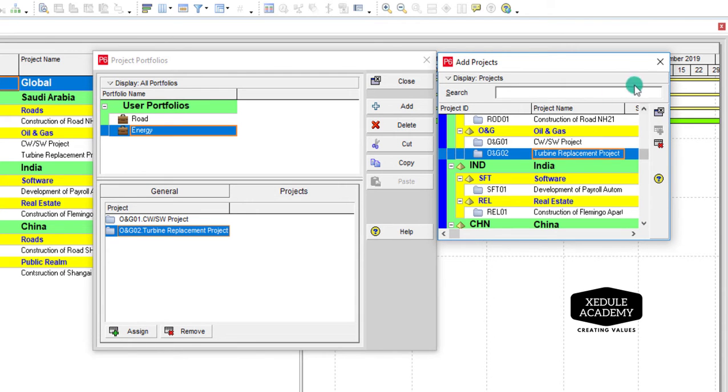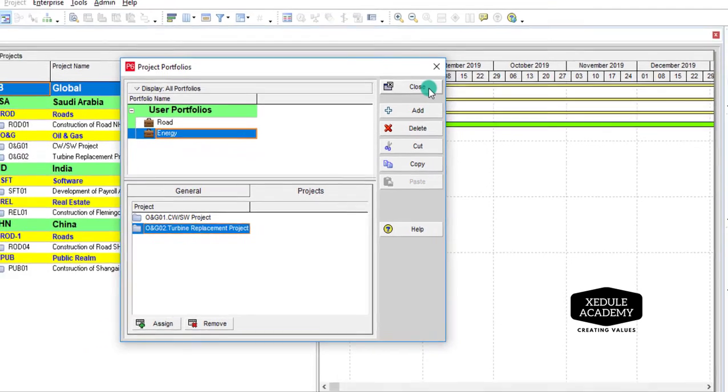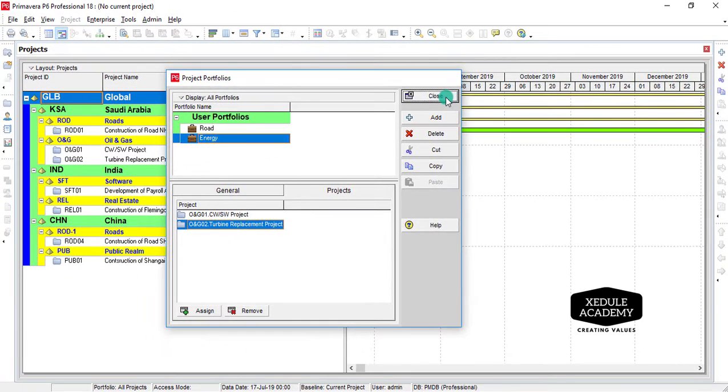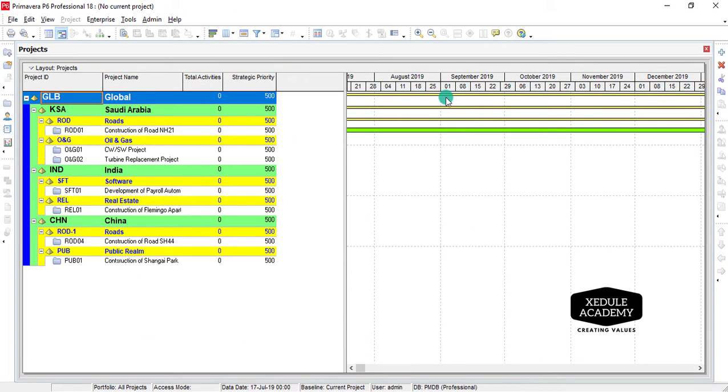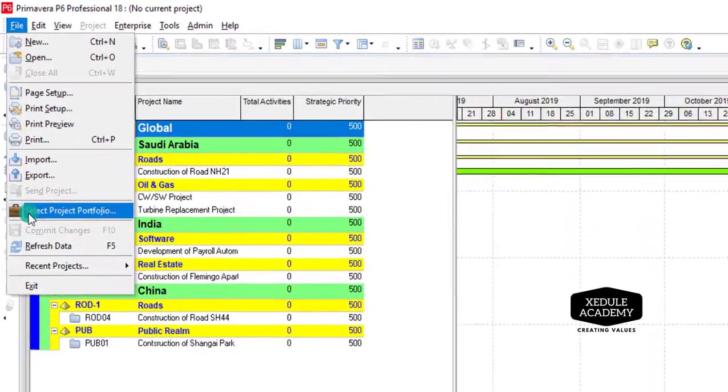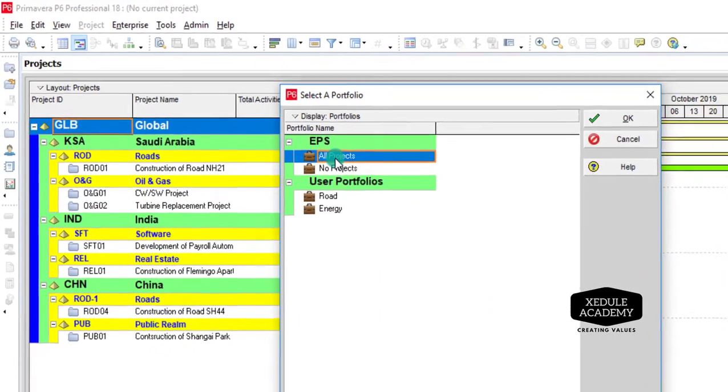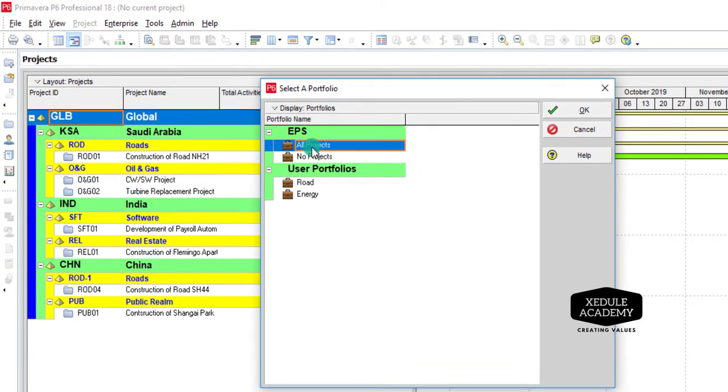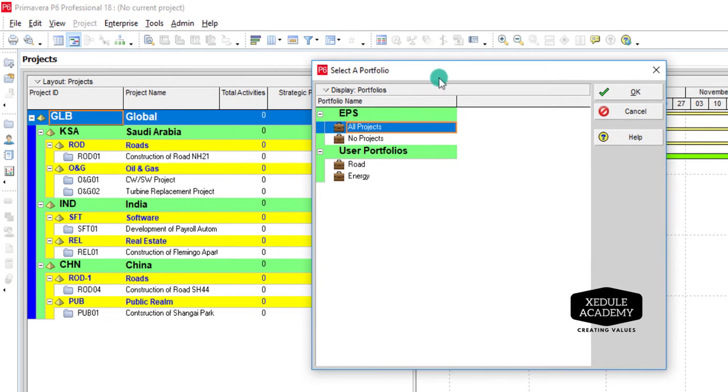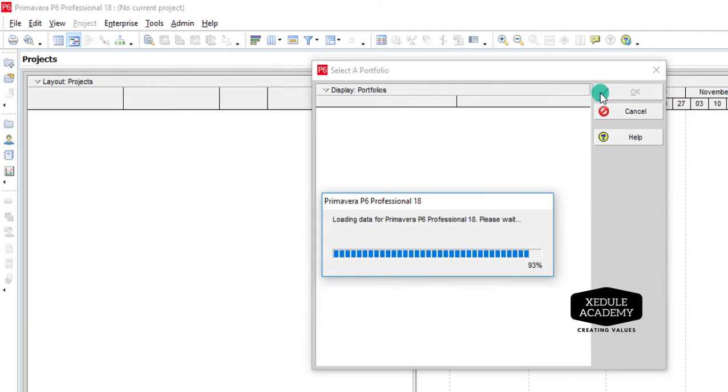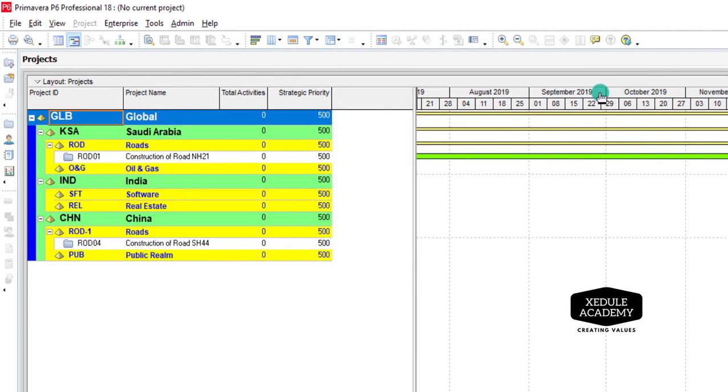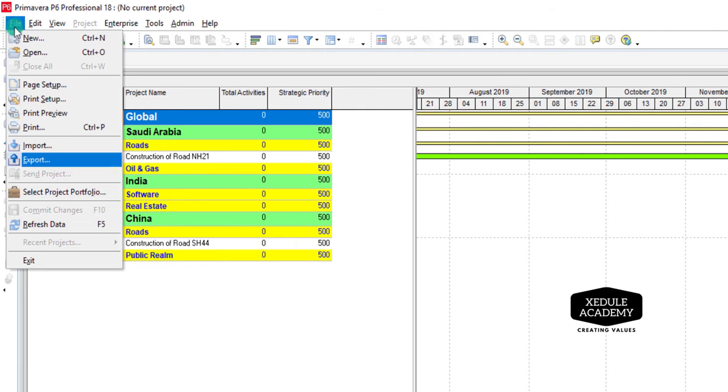Now close these windows. Select File from the menu bar, choose Select Project Portfolio. You can see two user portfolios we just added. Select Road and click OK. Now you can see only projects under Road's portfolio. You may choose Energy portfolio to see all the energy projects.